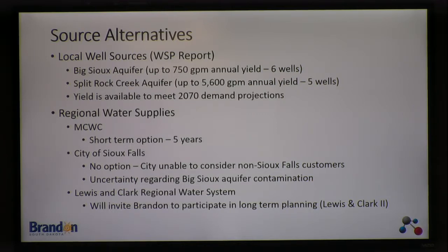Minnehaha Community Water Company, actually Brandon is in their service area, and so they serve customers around the city of Brandon. And we talked with Scott Buss, AE2S, and the city of Brandon folks about what options might be. And they have provided a short-term option, a time span of 5 years after the connection's made, where they could provide a certain amount of water. We'll talk about that when we talk about the short-term options.